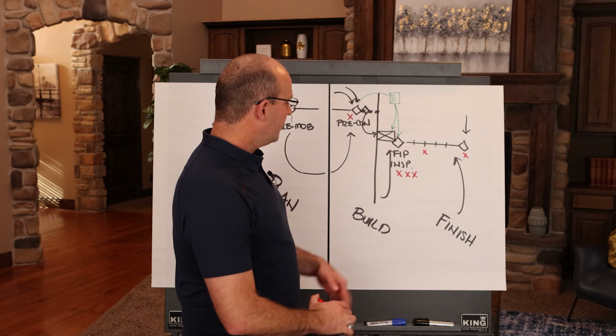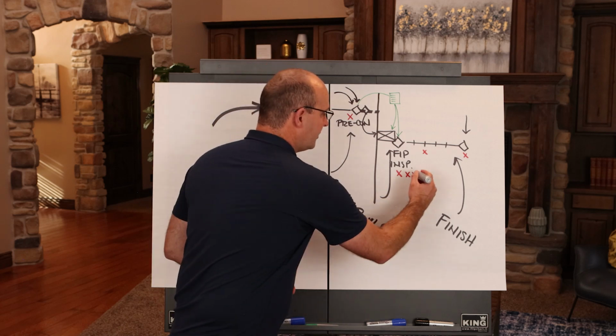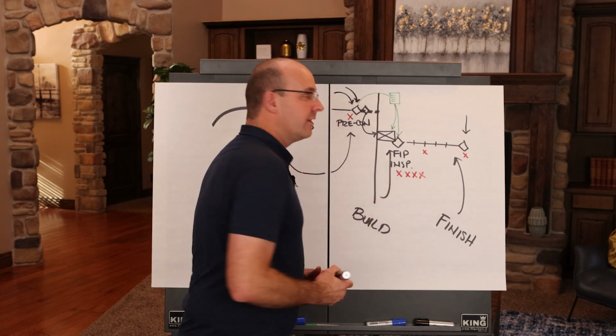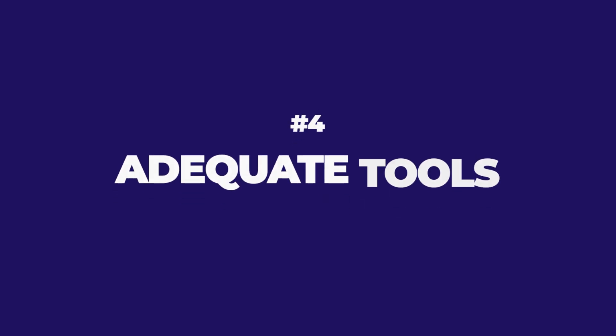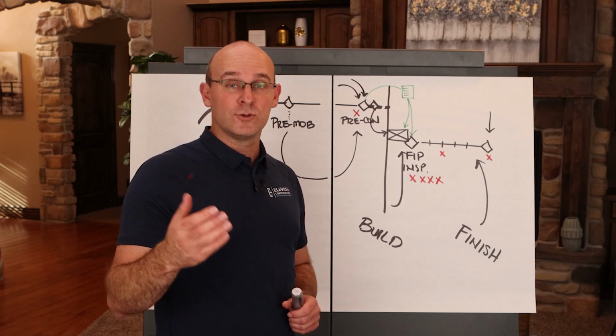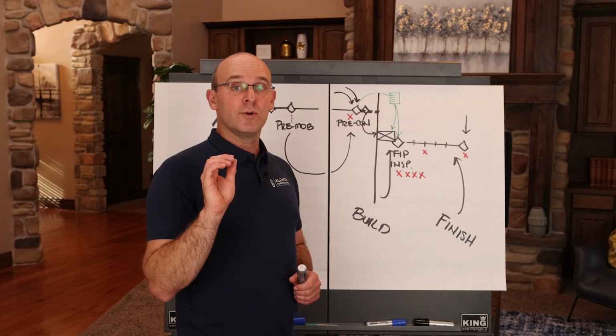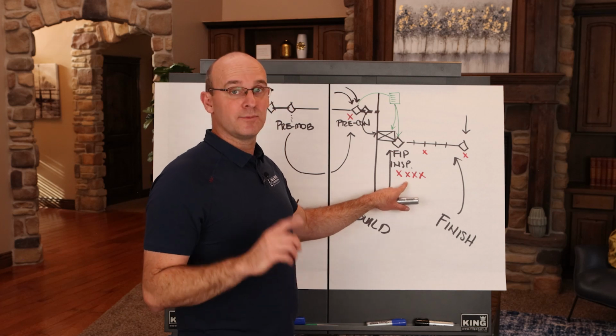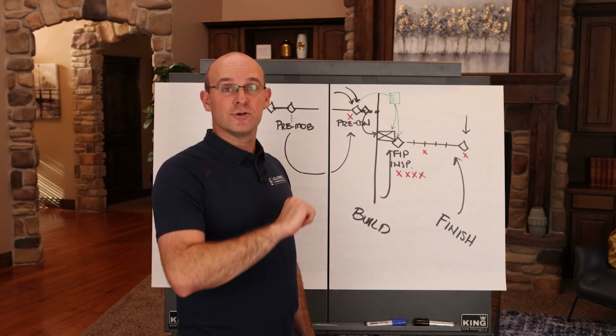Number 4, when you're out inspecting with the crew, you can make sure that the tools that the crew is using are adequate for the work being installed, because rework is sometimes caused by inadequate or outdated tools or damaged tools. So we want to reduce that by making sure that's a part of your inspection as the crew starts.